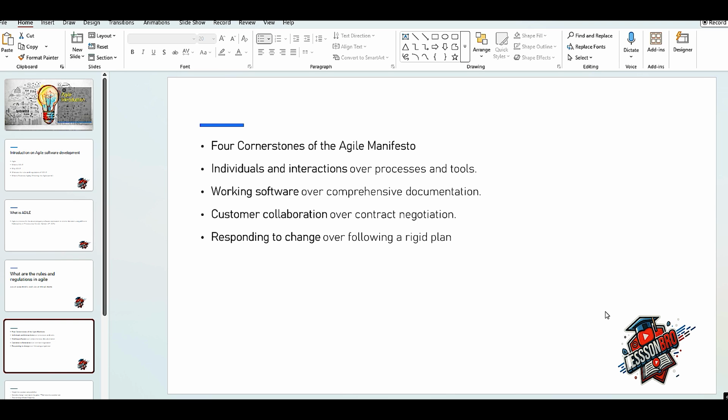In sprint 1, I have given a demo, and the customer comes and says, okay, it was a good demo, but I would like to have it like this. So as a team, as a project manager, what you should do is get into a kind of discussion with the internal and external team. If I take up the change, what are the blockers I have? What are the feasibilities I need to check? Okay, and if I'm accepting it, what will be the impact?